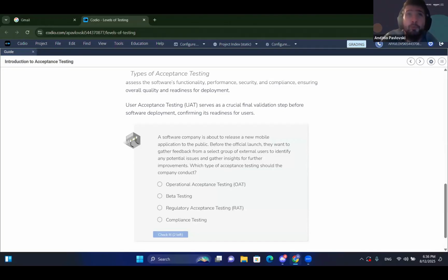The ideal way that this can be avoided and what we have adopted more recently is making the recordings of the meetings. We stopped sending notes because they were ignored completely. Testing reports and everything was, in this specific scenario, ignored. So what we did was we just sent out the recordings. And when they would say, oh, but this was not mentioned here, we would just refer back to the recording. And our manager at the time would also pull up the recording even while we're at the meeting.